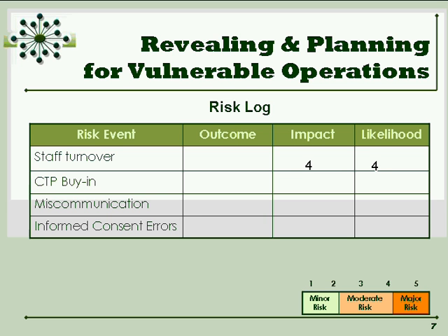The site was fee-for-service, and unfortunately, there was a misconception among the clinical team that referring patients to the study could take away resources or dollars from the clinic and the staff. This misconception and our failure to engage the line staff had a significant impact on the study, and it resulted in an unnecessary delay in our recruitment and certainly strained relations with staff until we were able to identify the problem. So a process like this would have been very helpful.